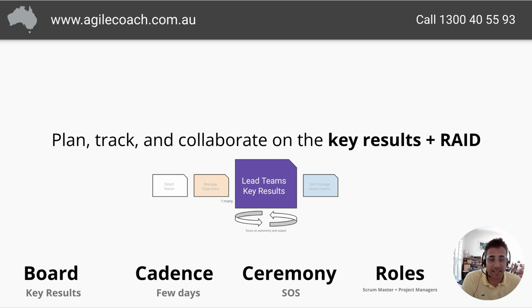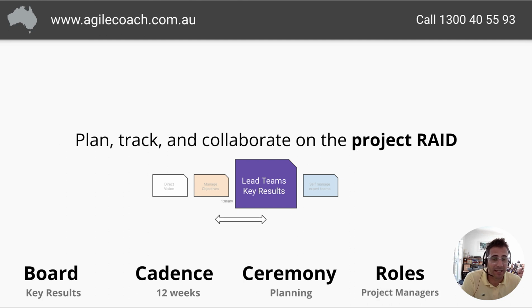Okay, so that's the key results, and I beg your pardon, that's the planning done. So you leave PI planning with something that looks like a set of key results which are committed to the quarter, with the iteration, an owner, an estimate, and all of your RAID captured as well. And that then allows you to track that through a normal sprint cadence afterwards.